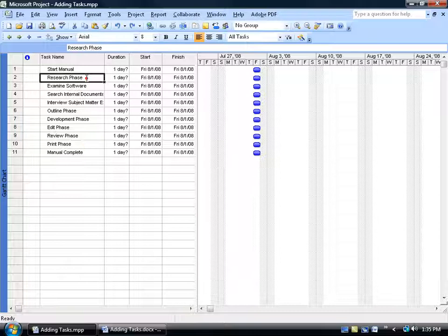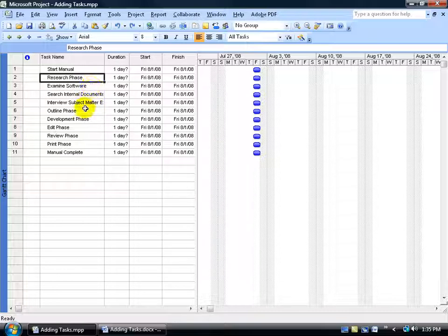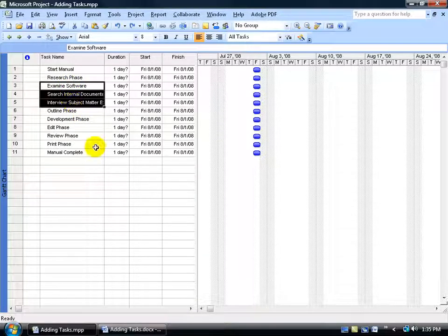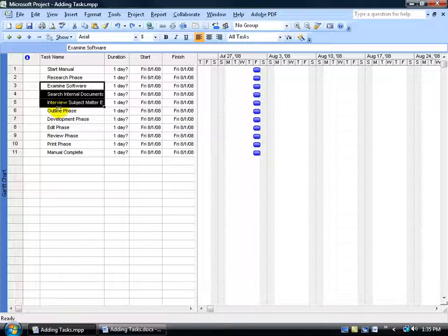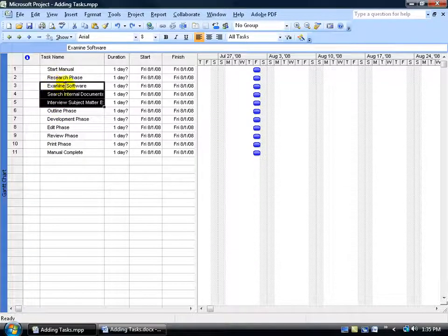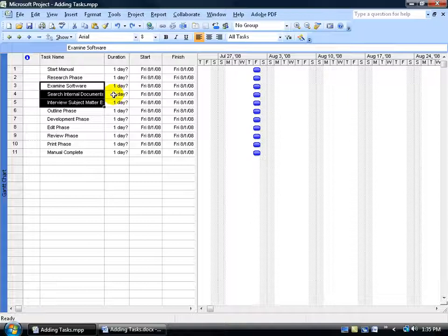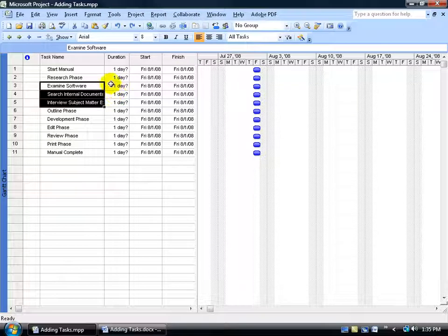My summary task, as you recall, I gave it the suffix phase, so my research, outline, development, and so on. And then below my phases we added the very detailed subtask. So when we complete a phase that means we have to complete all the detailed subtasks below. If I've only completed two of the three in this case then I still haven't completed my research.